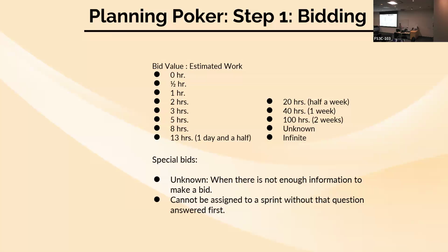For an example of this one that happens in this class very frequently, it is like, I'm going to have the boss for level 3. And inside of the test cases for the boss for level 3, it has the test case of does the boss function correctly? And I'm just going to be in there like, what does correctly mean? I can't put an estimate on this unless I know what this means, what it means to be done with this task. This could be a half-hour task. It could be 20 hours. It could be 100 hours. I don't know what you mean by correctly, so we need to define that more thoroughly.